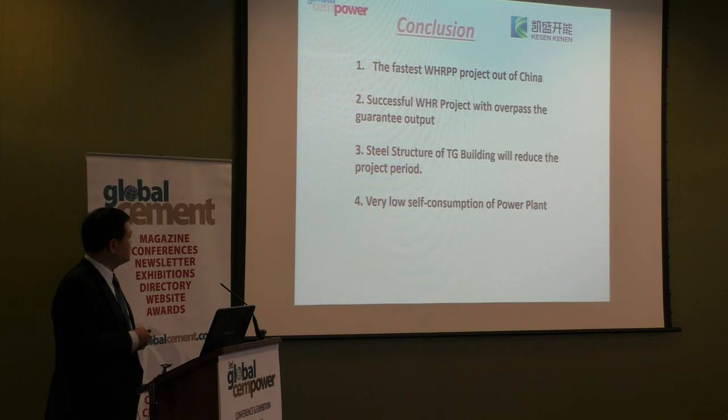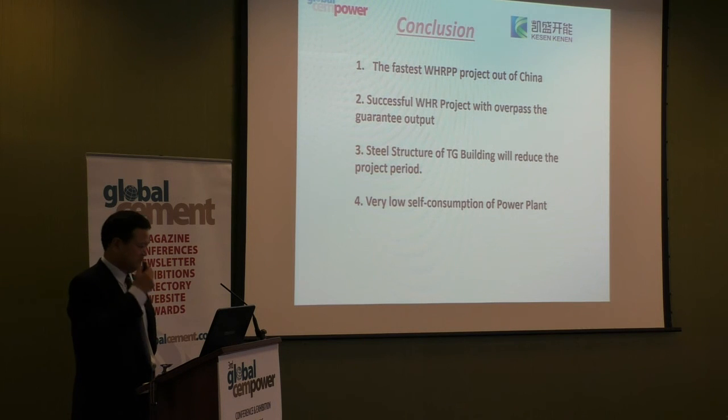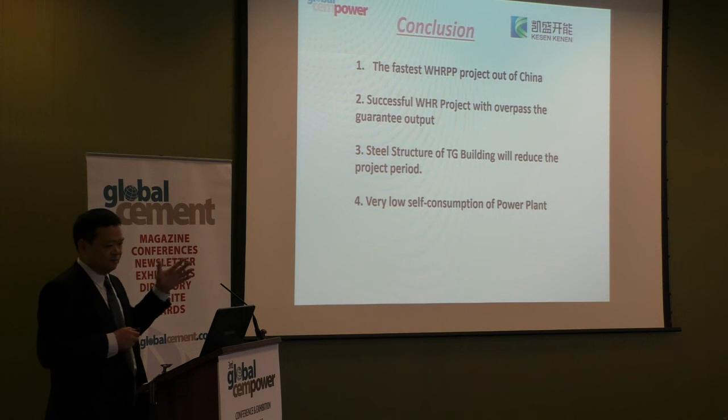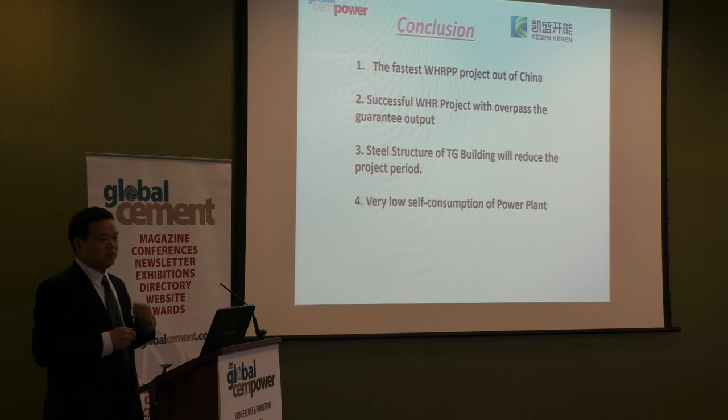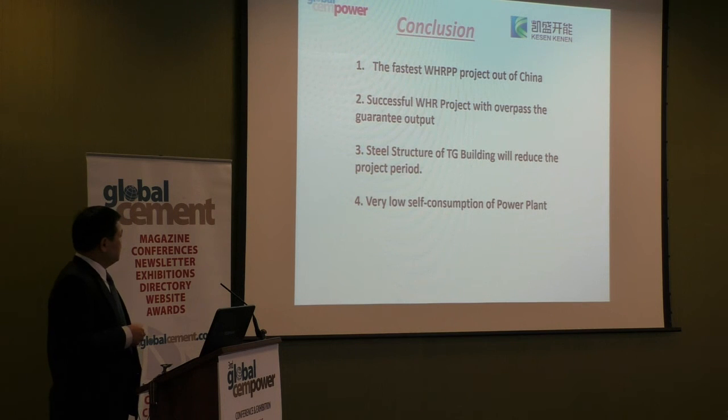So, conclusion for this project: it is the first WHR power plant project outside of China. In China, we can typically finish a project 9 months after signing the contract until synchronization of the WHR. For overseas projects, it's a little more difficult because of a lot of communication, technical discussion, and logistics distance. Second point is a successful WHR project that surpassed the guaranteed output. Third, the steel structure of the TG building reduces the project period.